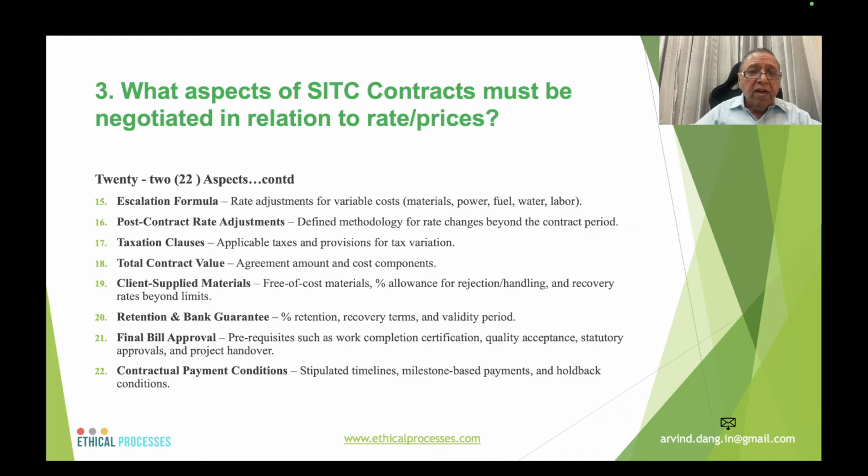cost materials to be supplied, and percentage allowances allowed to the contractor for rejections and handling, and recovery rates beyond limits, retention and bank guarantees for payments, percentage retention, recovery terms, validity period, final bill approval, how it will be done, and contractual payment conditions, stipulated timelines, milestone based payments, and holdback condition.